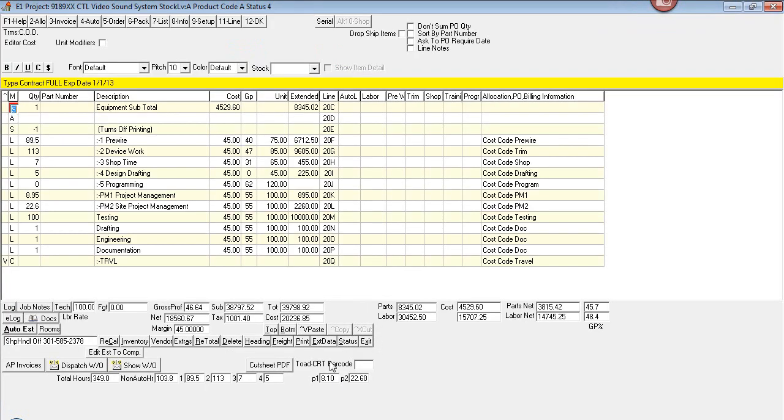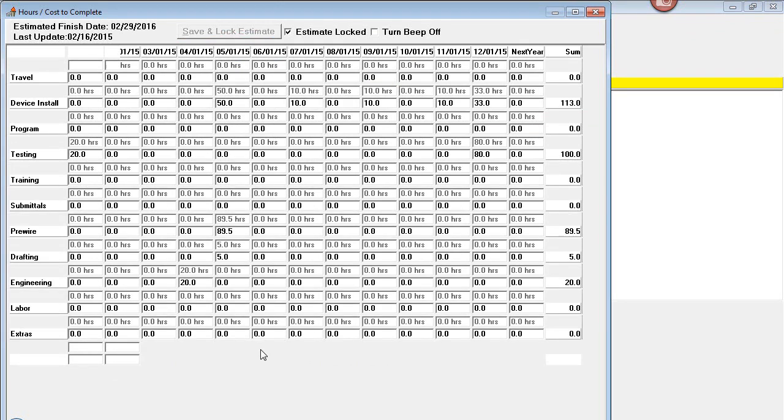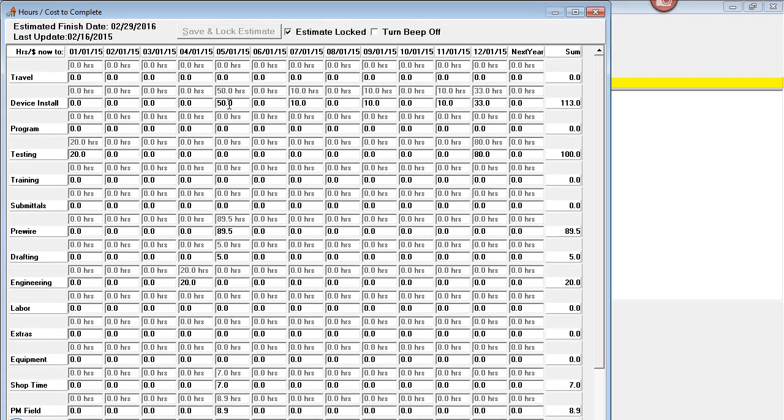Okay. So now that we've got those established, when we come over here and click over here, notice the system has locked in all the time. So we see our estimate, and it's no longer down in this field right here. It's actually locked in our time. It's locked. This is our estimate, but it's also locked in our time. So we've kind of set our budgets. And you notice this is locked, and you can't actually edit these fields on purpose, so that you don't disturb this estimate, because now we want to see how time plays out against this